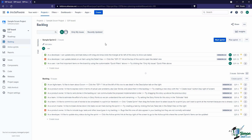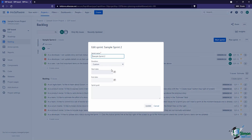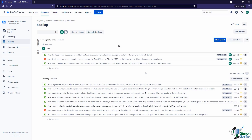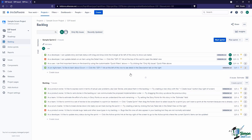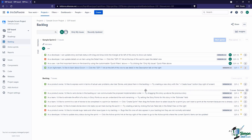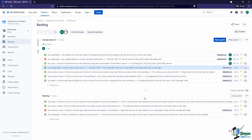Because we had Jira add those to a new sprint automatically, we already have a sprint created. We could also create a new sprint if needed, or edit the sprint — for example, changing from two weeks to four weeks with a custom start and end date. The next step is to add any issues from the backlog that we need. We can left-click and drag issues up into the sprint, or use the drag handle to move multiple issues down and add them quickly.